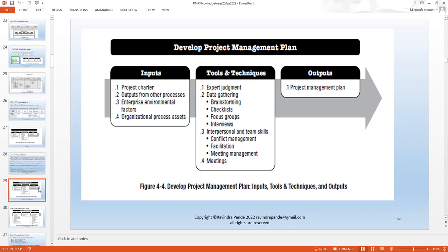But overall, I'll start basically creating some tasks and allocating them to a resource set with the timelines. Timelines in the sense of schedule. So Ravindra has to do the iris scan biometric scanner fitment by, let's say, the 15th of May. He can have 3 resources to take with him. One is an engineer, the guy who is going to fit. Another is a network guy who will do the cabling and connect with the server. Third could be a guy who has expertise in biometric configuration, system configuration, or software development, and so on and so forth.